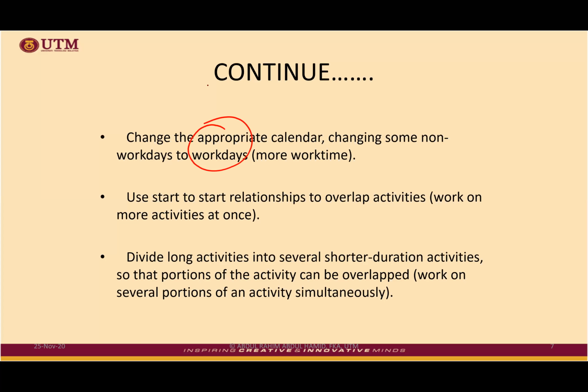The one that I showed you before, when we calculate at the end of the network diagram, we are going to have the overall project duration. The overall project duration that we get from the calculation is in working days, solid working days without the holidays. Let's say, for instance, our overall project duration is 20 days.